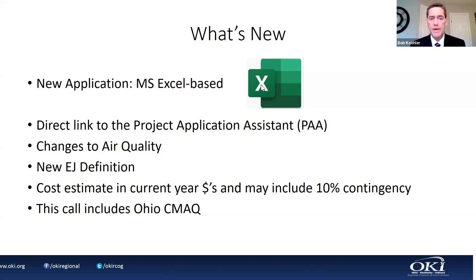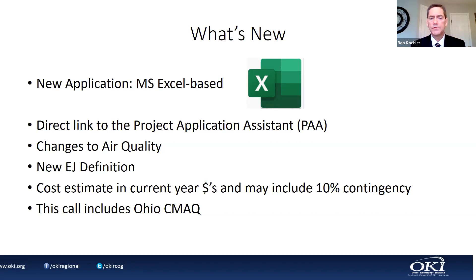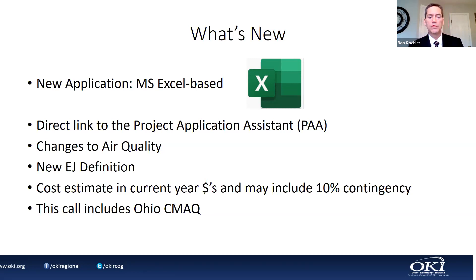You still have to put the particular values into the cells, but it'll be right there for you. It'll also improve the efficiency and accuracy of our review as well. We have some changes to the air quality score, as was approved last month by the ICC. We have a new EJ definition, also reviewed and adopted by the ICC. For cost estimates this year, you can submit up to a 10% contingency — it'll be a straight 10% if you choose to use one. And this year's call includes Ohio CMAC.